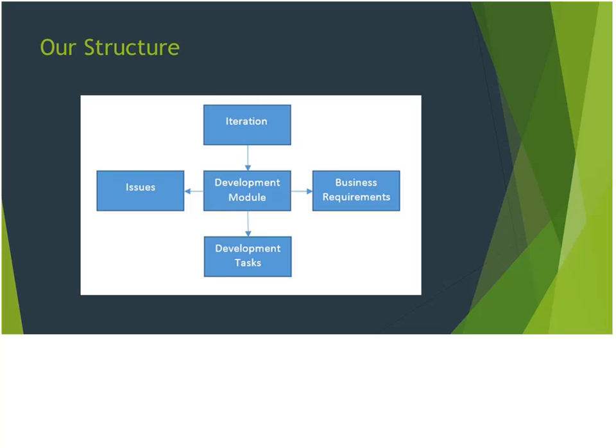Then underneath down the bottom in the south, we've got the development tasks. So let's say the 10 things required to deliver a certain module. It might be in the case of configuration, task 1 is add all the fields. Task 2 might be configure the form. Task 3, reviews. Those kinds of things, very high level in this case, but you get the idea. Obviously, that'd be a bit more complicated for, say, plugin creation, but it was those kinds of things, just having a track of, say, 10, 20 tasks, and then giving people an idea of where people are up to in developing those modules.